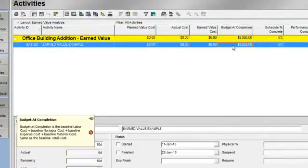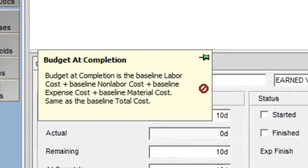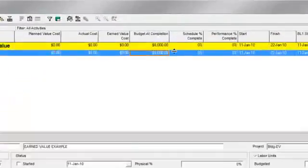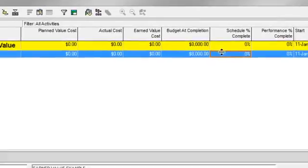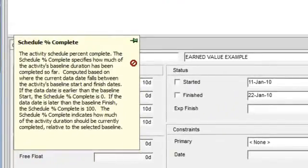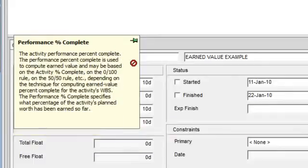Let's look at budget at completion. Budget at completion is the sum of baseline labor, baseline non-labor, baseline material, and baseline expense cost. Schedule percent complete identifies how much of the project's baseline duration should be completed as of the data date. And performance percent complete identifies what percentage of the activity's planned value has been earned so far.